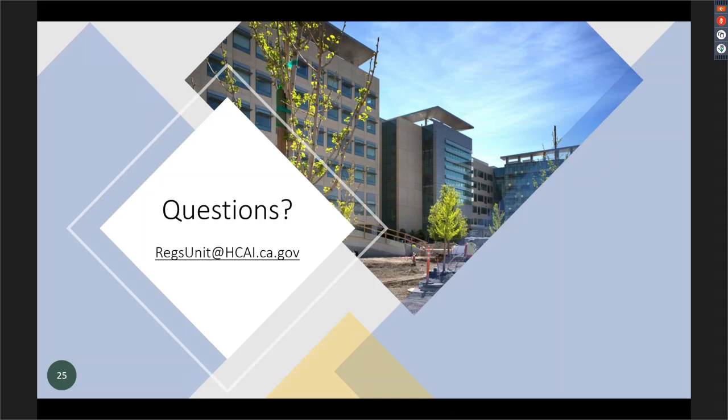You can proceed with work on a true NMA. When I say true NMA, it's because we don't want you calling something an NMA just so you can proceed with work. If it's materially altering, there are consequences to calling it an NMA just to get the work moving. And one of those consequences could be that NMAs no longer are allowed to proceed with work.